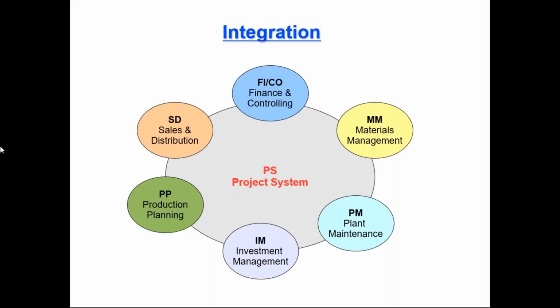If it is not fitting, you can reject the machine and send it back to the vendor, right? If you order 10 machines, and out of 10, 2 are okay and 8 are not okay, then you can send all these 8 machines back to the vendor, and the 2 you can use in your project. So how you are going to track and manage all these things, you can manage with a QM module.